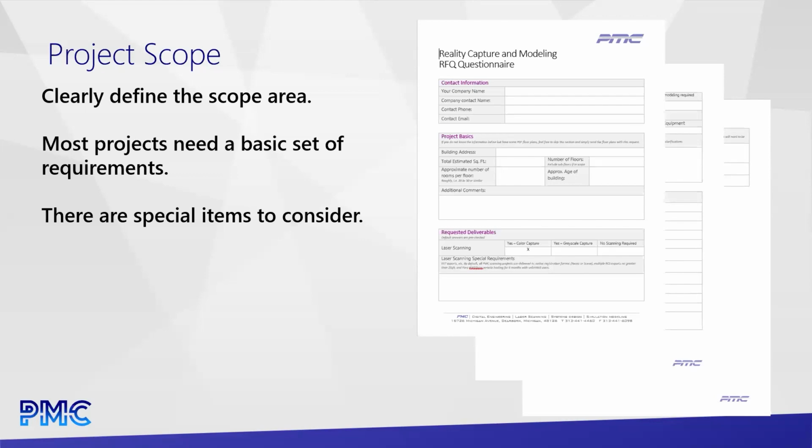Worst case, and we see this a lot in commercial buildings, older buildings, is there is nothing. And then we just need some help. We can maybe go and pull some tax records and get at least what the city thinks is the square footage of the building. Or we can measure it in Google Earth, but that can be a little tricky on some of these complex older buildings to understand the stack up and how many floors there really are. But somehow we've got to figure out the square footage. For us and anyone else in this business, the square footage is going to drive our scan counts, which is going to drive the cost of what we put together for your estimate.